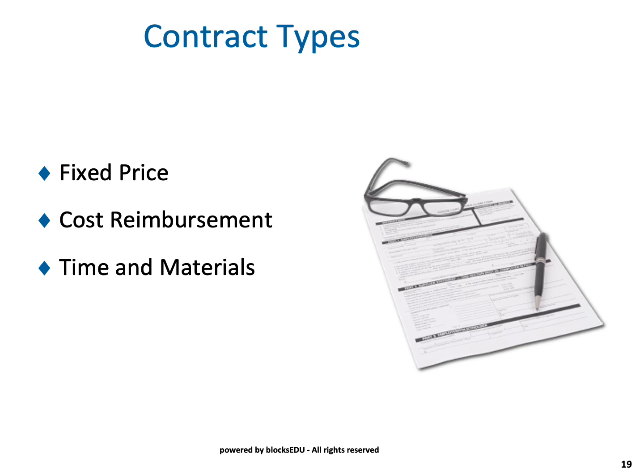The cost reimbursement is basically the same idea, a statement of work agreed to by both yourself and the vendor out there, but it's basically a fixed amount plus any cost associated in them to deliver that statement of work. So it's a little bit more in favor of the vendor than it is to your organization.